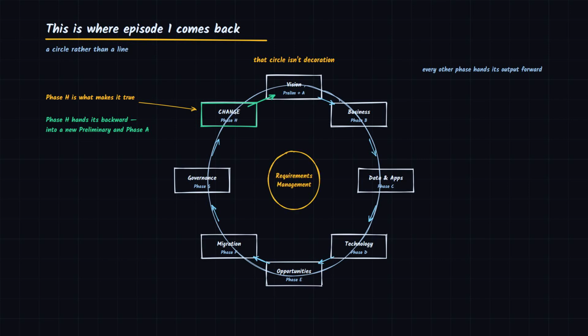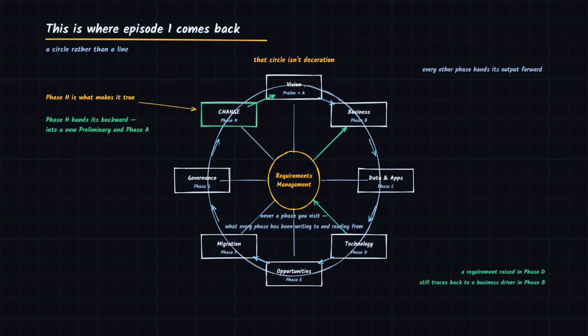In the middle of that circle sits requirements management. It was never a phase you visit. It's what every phase has been writing to and reading from, so a requirement raised in Phase D still traces back to a business driver in Phase B.